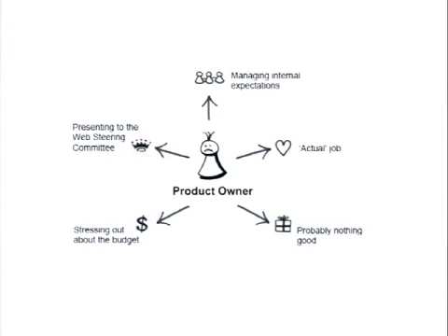So in Scrum, that's sort of how it works. The Scrum Master can take on the responsibility of product owner if the product owner is not available. And this works out really well because, like I said, oftentimes the product owner is not thrilled with this job. And in that case, you really have to help.